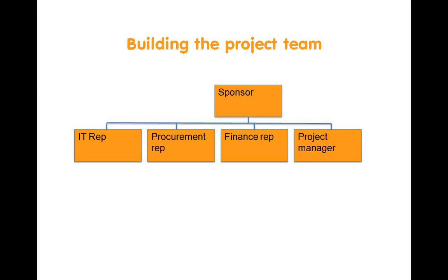If you try and do it by yourself, just as a finance operation, I hate to say these words, but it will fail, because ultimately what e-invoicing is about is a supplier onboarding program, and the person or the group in the organization that owns the supplier relationship ultimately is procurement and not finance. So you must have procurement on board to make this happen. So do get them on board early. Have them on your project team. Then we're looking at a finance rep and a program-shaped project manager. And sometimes that will be the procurement rep or it would be the finance rep. Sometimes it's both working together.